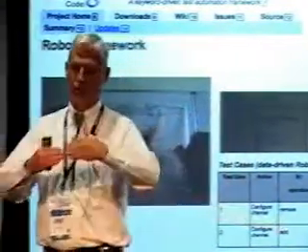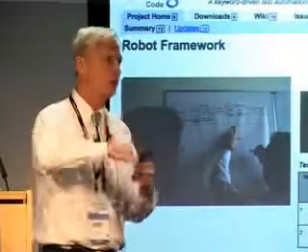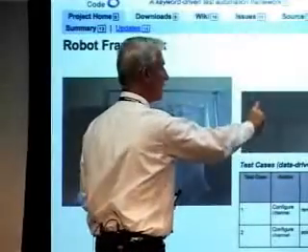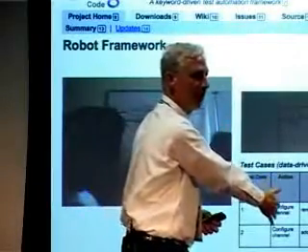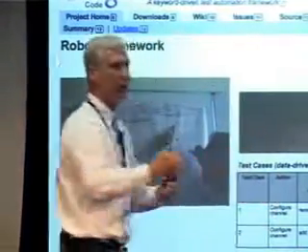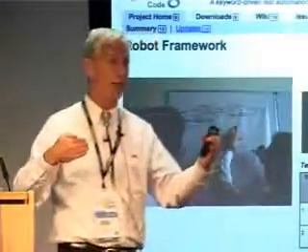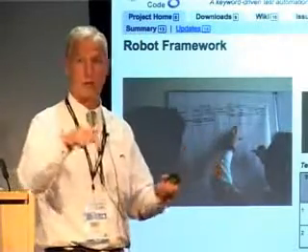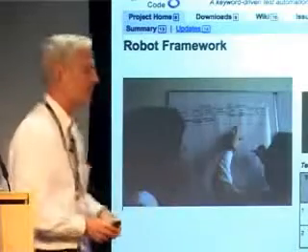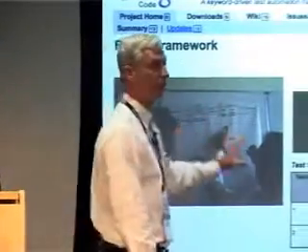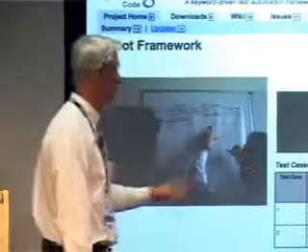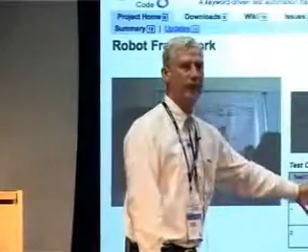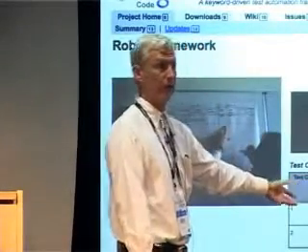And when you do this, you reduce handoff waste, you reduce transformation waste, so that the examples become the specifications, become the acceptance tests. And if you do this, there'll be this bridging of the communication gap, to repeat the title of the book by Gojko Adzic, who's based here in London, who promotes specification by example. And we found this quite useful in offshore development, and I encourage it. The combination of spec by example with a table-based ATDD tool like Fitness or Robot Framework.